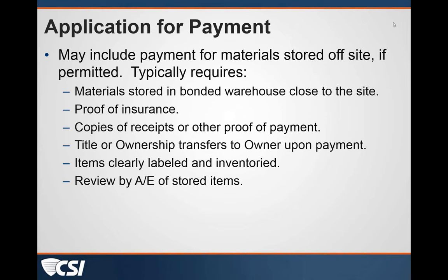Be aware that if you're going to have an owner that agrees to pay for stuff stored off-site, and he's going to require you to go look at it, it's not standard services. That should be additional services for your time and expenses to go look at that stuff.